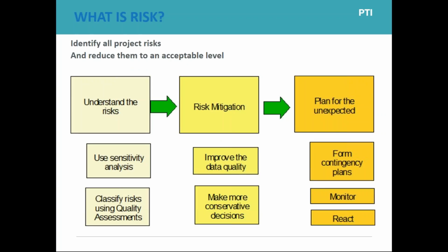So what are the principles of management? I mean, very simple principles. What is it you're doing? You're outsourcing a project to a service provider. What are the risks of outsourcing to a service provider? Are they financially stable? So if we take are they financially stable as a risk, how would you mitigate that risk? Probably the best way to mitigate it is to use a different service provider.